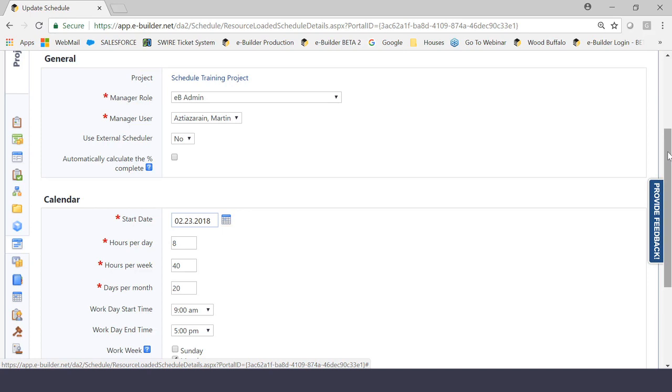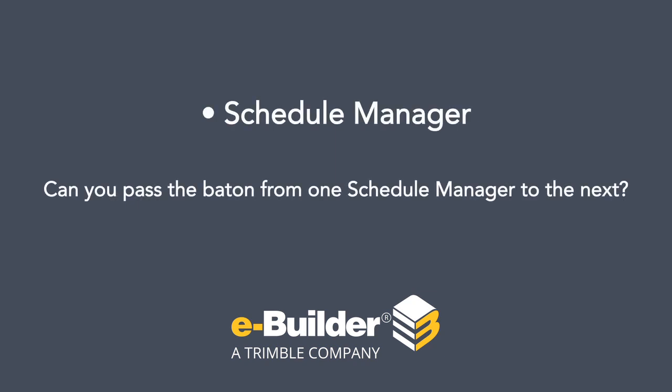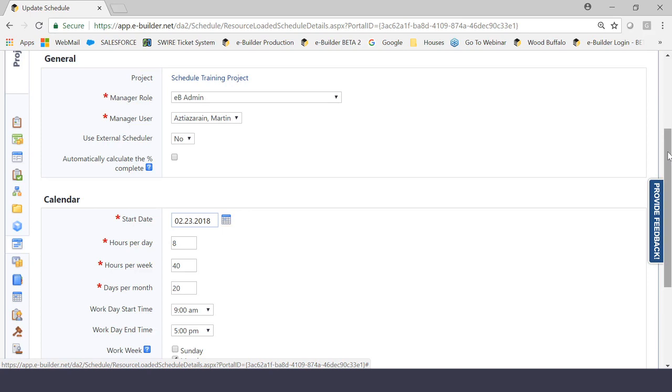But the importance of this role is very high because this is the person that's going to control the schedule from beginning to end. Now, the first question that I always get here from some of our clients is, can this person be transitioned from one person to another? In other words, can you pass the baton from one schedule manager to the next? The answer is absolutely yes. This is something that could be edited throughout the course of the project, specifically for those clients that change the schedule manager or the person that controls the schedule as the project goes from phase to phase. So please make a note that that is a possibility. But for now, we're going to choose myself as the schedule manager and move on.